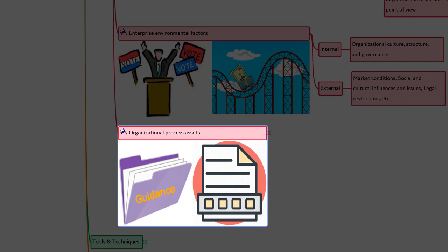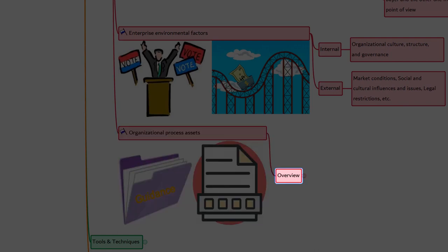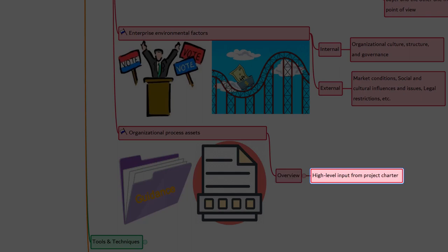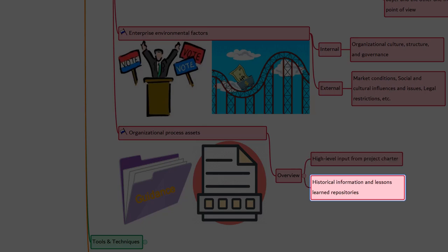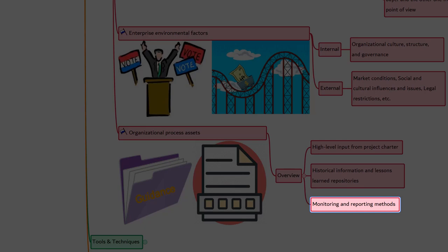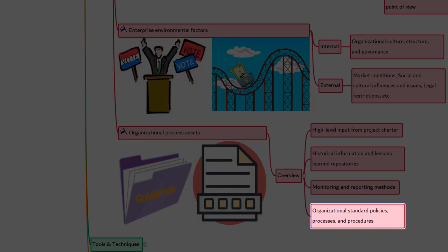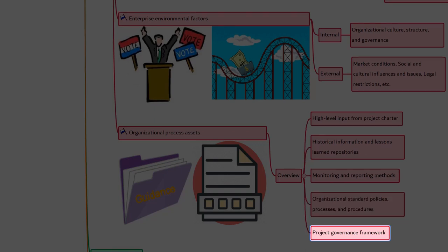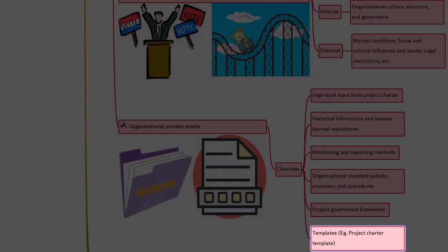Let's talk about organizational process assets. The OPA will have influencing factors such as historical information and lessons learned repository — for example, project records and documents, information about results of previous project selection decisions, and information about previous project performance. Monitoring and reporting methods, organizational standard policies, processes and procedures, portfolio, program and project governance framework are some inputs from OPA. In fact, the governance function and process can provide guidance to decision making. And lastly, templates such as a project charter template can even be an input.